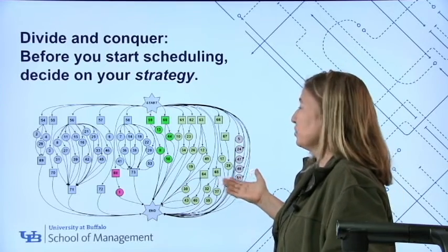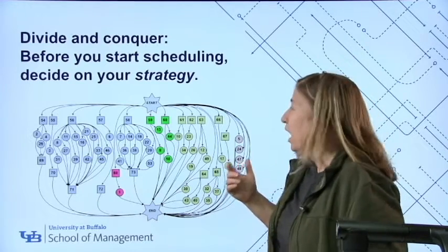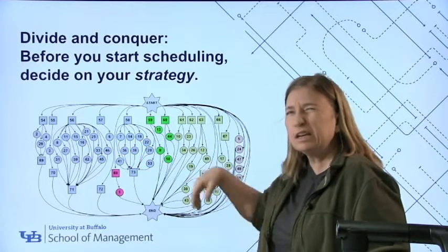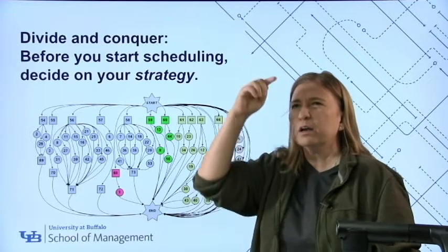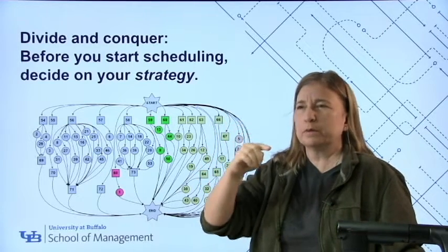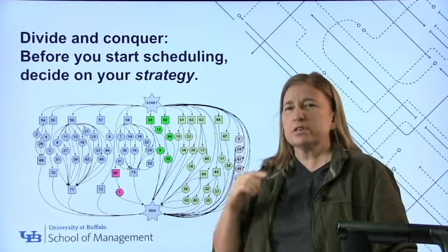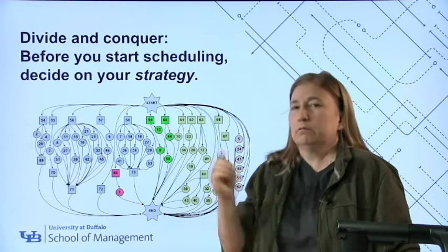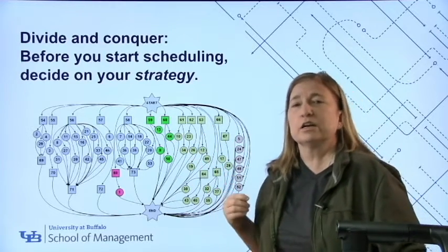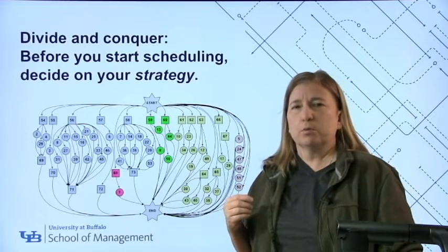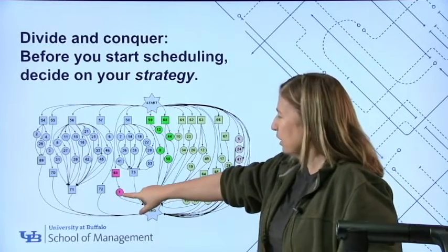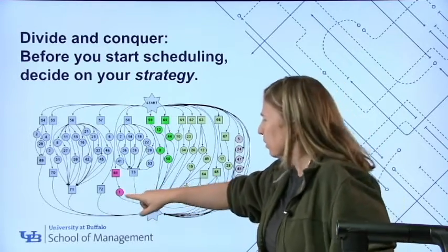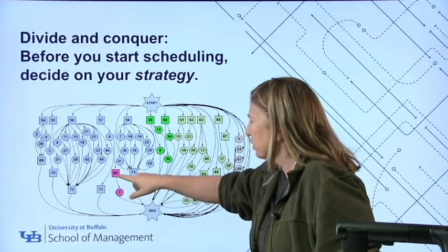Another strategy here, actually some directors have done this before, and that's that, the little circles are filming tasks, and they're actually in the case study in table 1. They're described according to the order of the plot. Some directors insist upon filming scenes in the order of the plot. That could be your strategy too. If you're feeling particularly artistic, then your strategy would be, I want to work my way down table 1, which means that I want to do this filming task right here, number 1, right away, except I remember, wait a minute, precedence relationships.